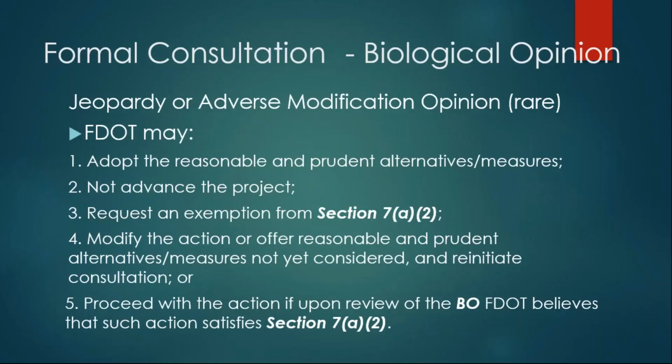Also, we can end up with a jeopardy or adverse modification opinion, which is very rare. And in those instances, the FDOT has a few options. We can adopt the reasonable and prudent alternatives, or we can choose to not advance the project. We can request an exemption, or we can modify the action to not have those impacts.